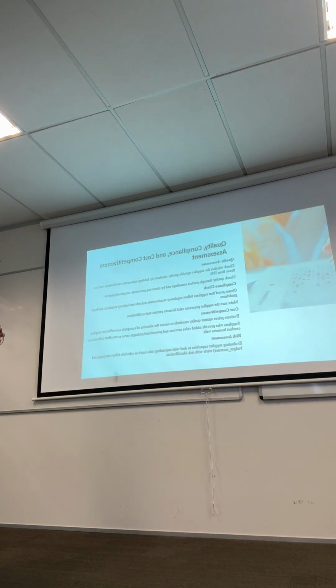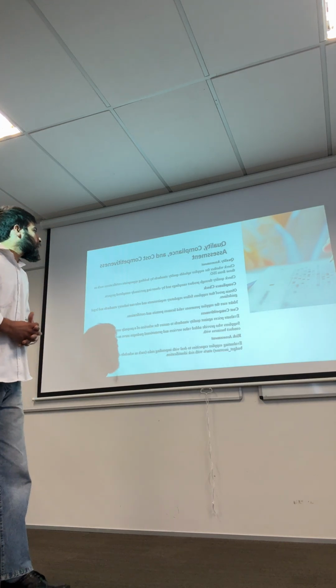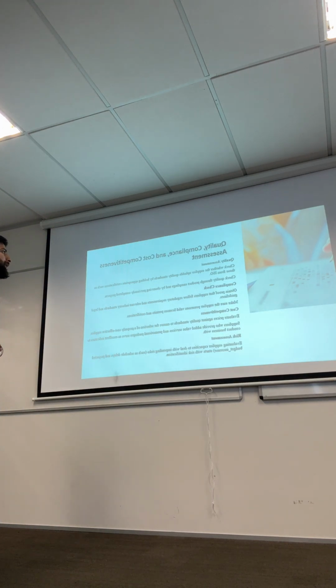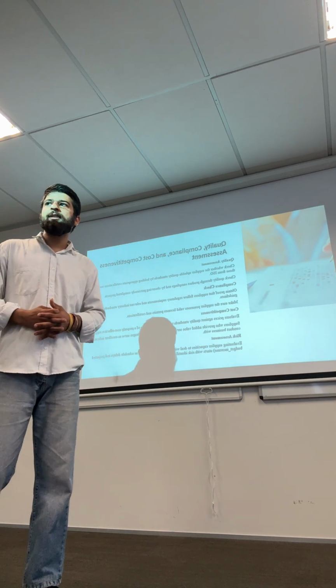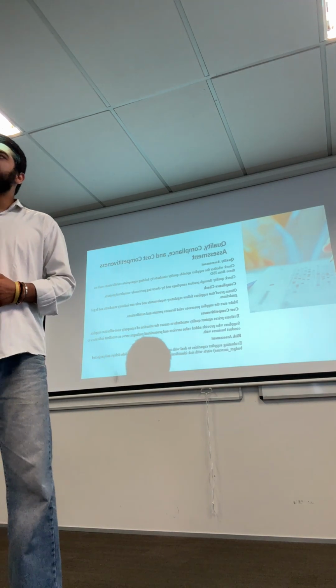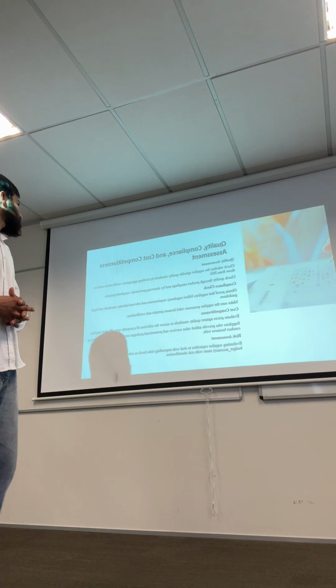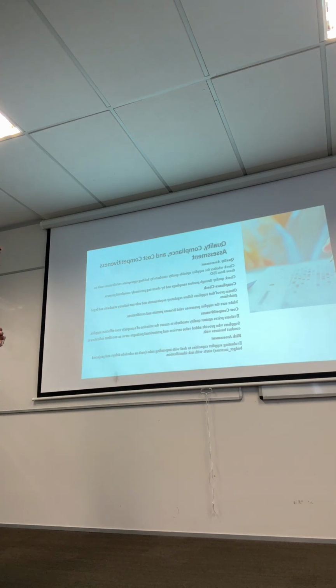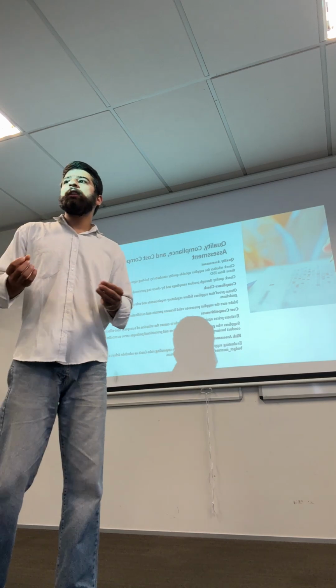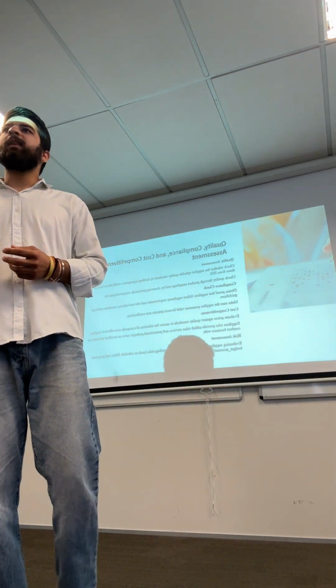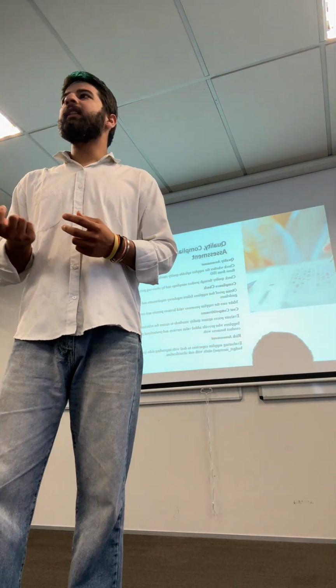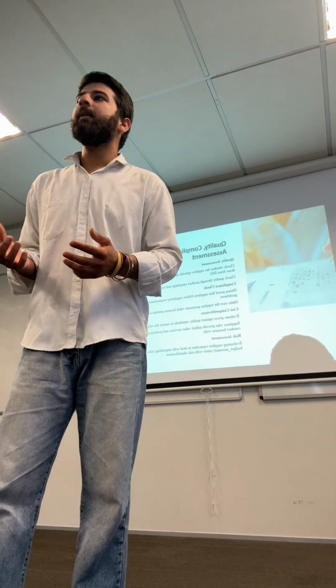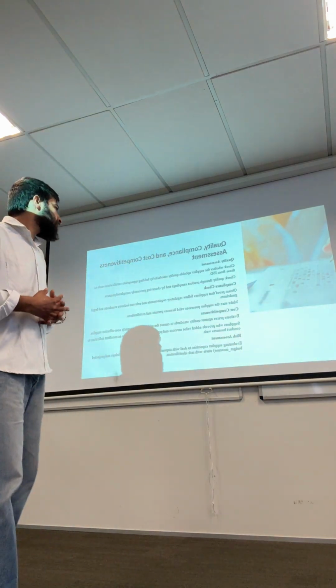Next, quality, compliance and cost competitiveness assessment. Quality assessment. Check whether the supplier upholds quality standards. So it is a must that the supplier has certifications like ISO. Check quality through product sampling. We can check the quality of the supplier's material by taking samples, and we can send them to the lab and check whether the quality is good or bad.